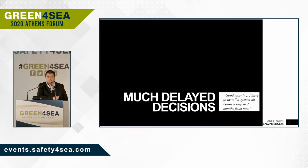The second, and again very popular issue, is the much delayed decisions. Almost on a daily basis, we receive telephone calls from superintendent engineers, from technical managers, from our clients, or from new prospective clients, that they have to install a system within the next 2 months. And it's really difficult to persuade them that practically we do not have enough time to do any decent study and for themselves to do a proper preparation.